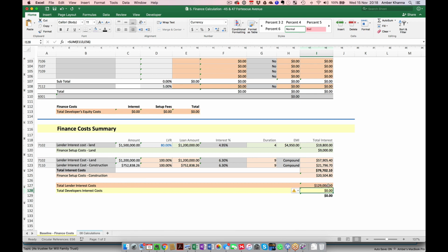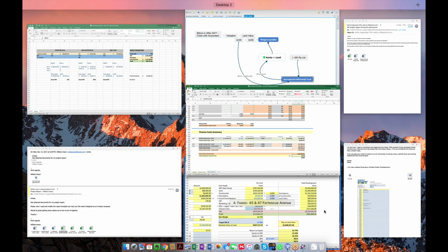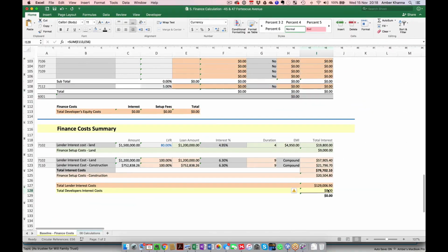That's developer equity. So where is the interest for developers' equity that you have to pay them, 20%? Where is that? I haven't allowed for that on the finance calculation. Well, then it has to be allowed for in there, because your other investors putting in money can only touch this, since that money has to go out first. Okay. So you're saying put all your interest repayment for your investors on your finance table, and then your profit will actually show you what my Excel is showing you.